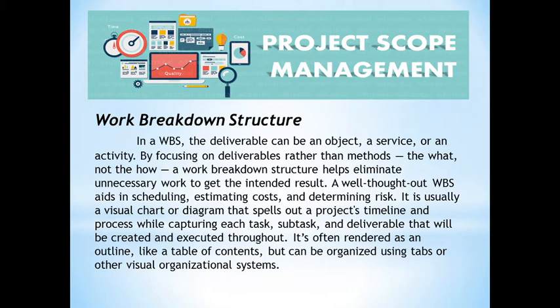In a WBS, the deliverable can be an object, a service, or an activity. By focusing on deliverables rather than methods — the what, not the how — a work breakdown structure helps eliminate unnecessary work to get the intended result. A well-thought-out WBS aids in scheduling, estimating cost, and determining risk. It is usually a visual chart or diagram that spells out a project's timeline and process while capturing each task, subtask, and deliverable. It is often rendered as an outline like a table of contents.